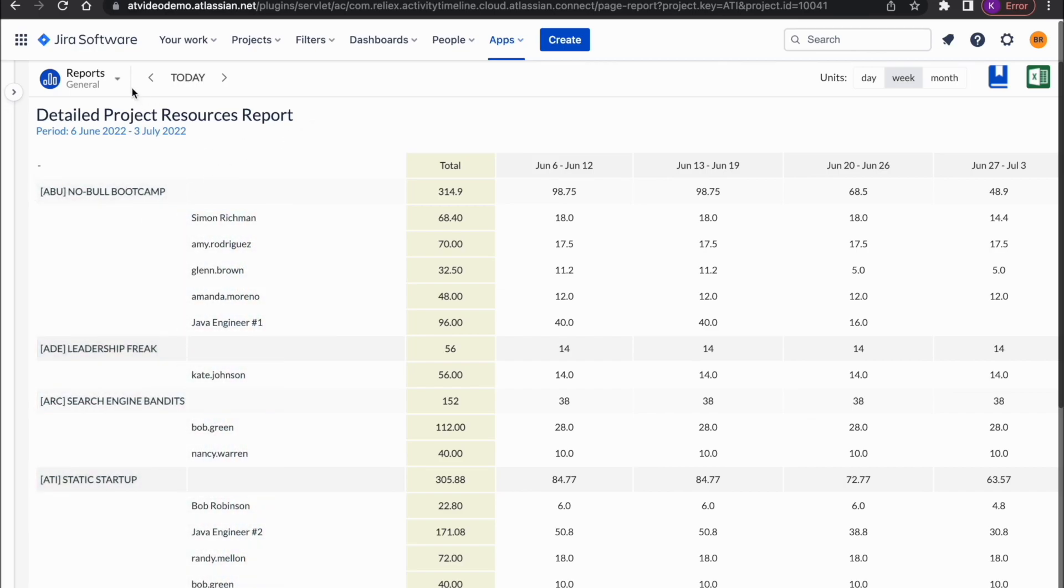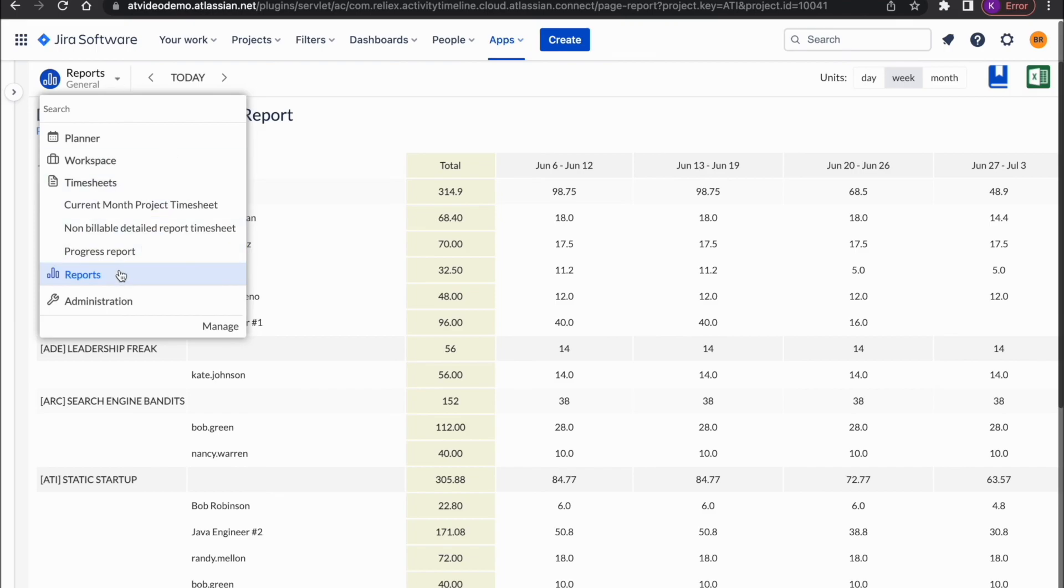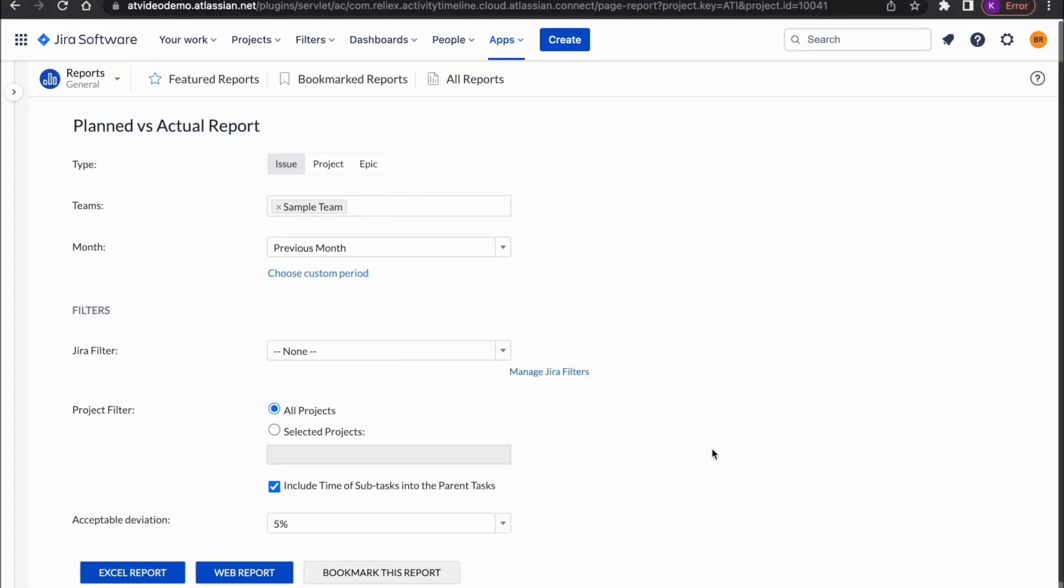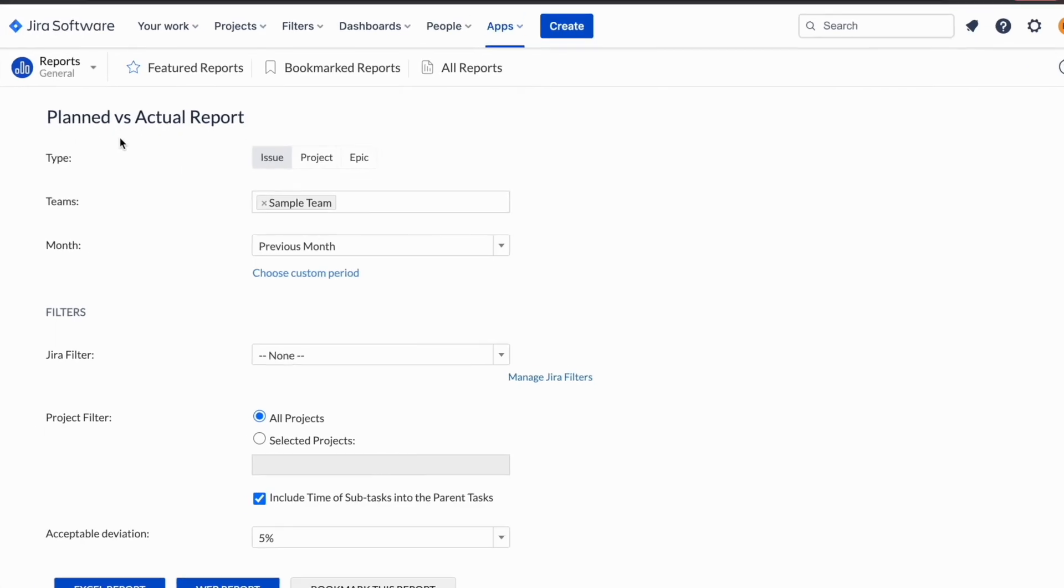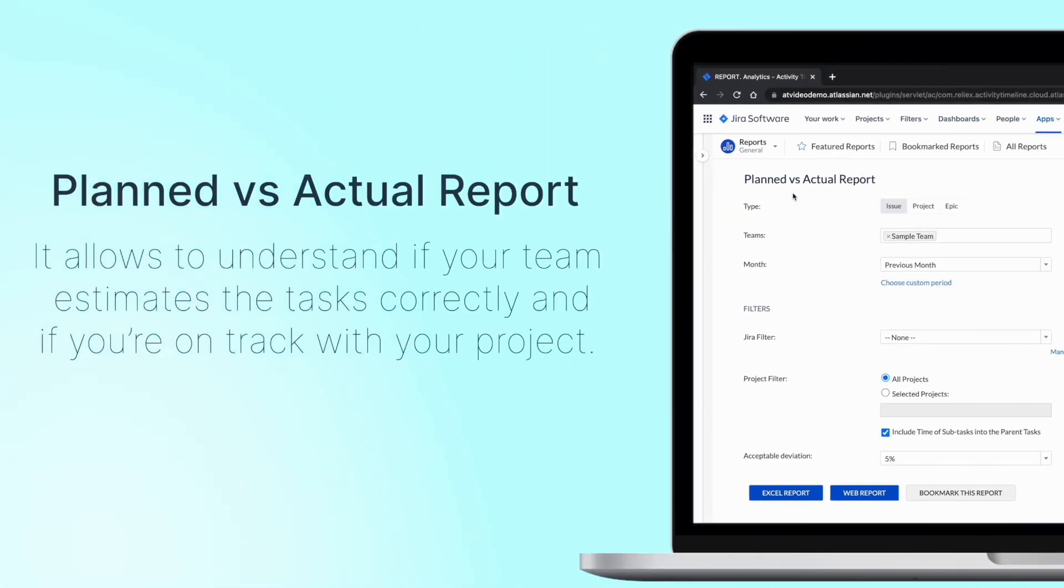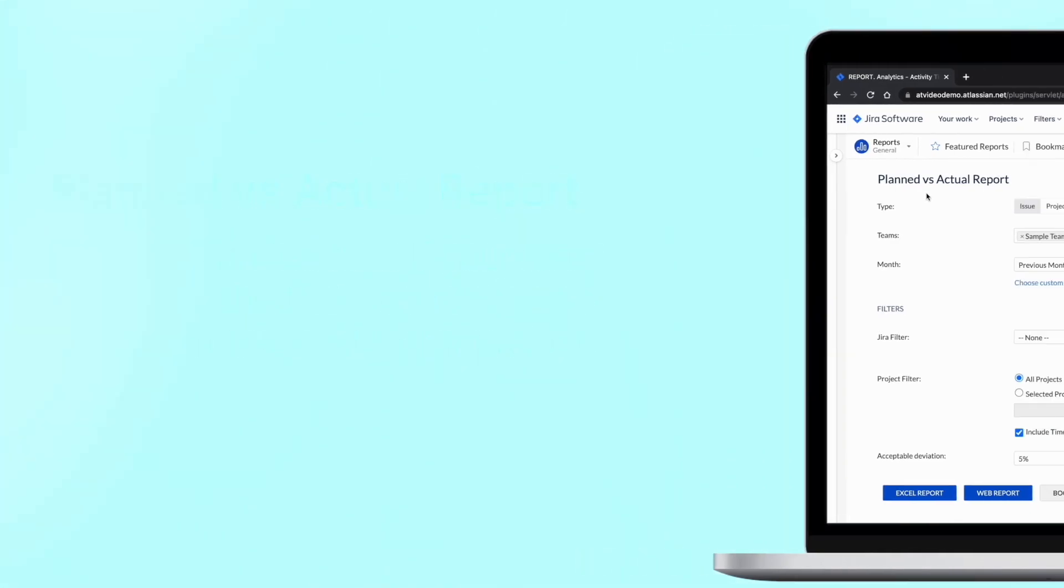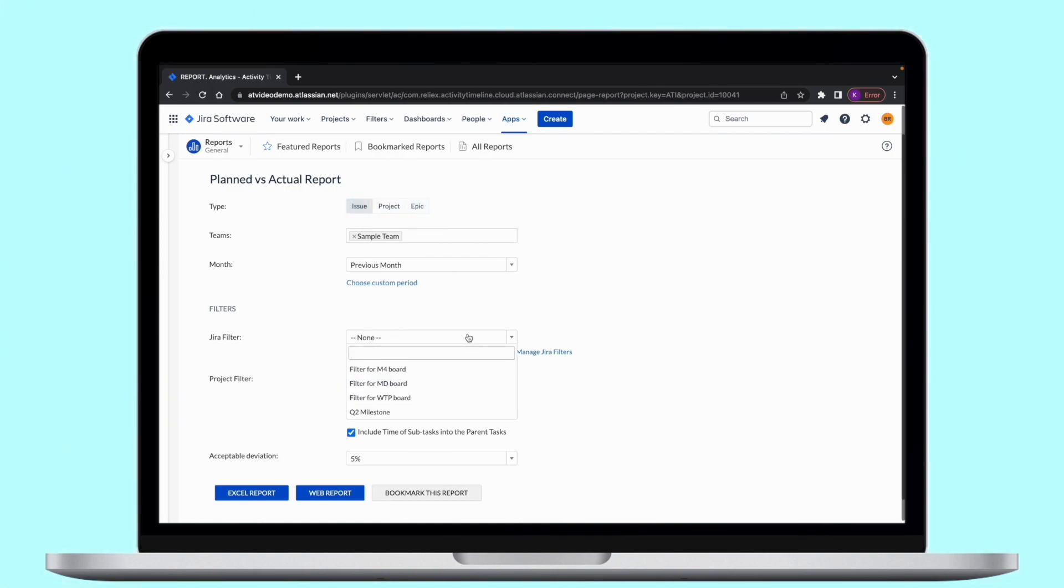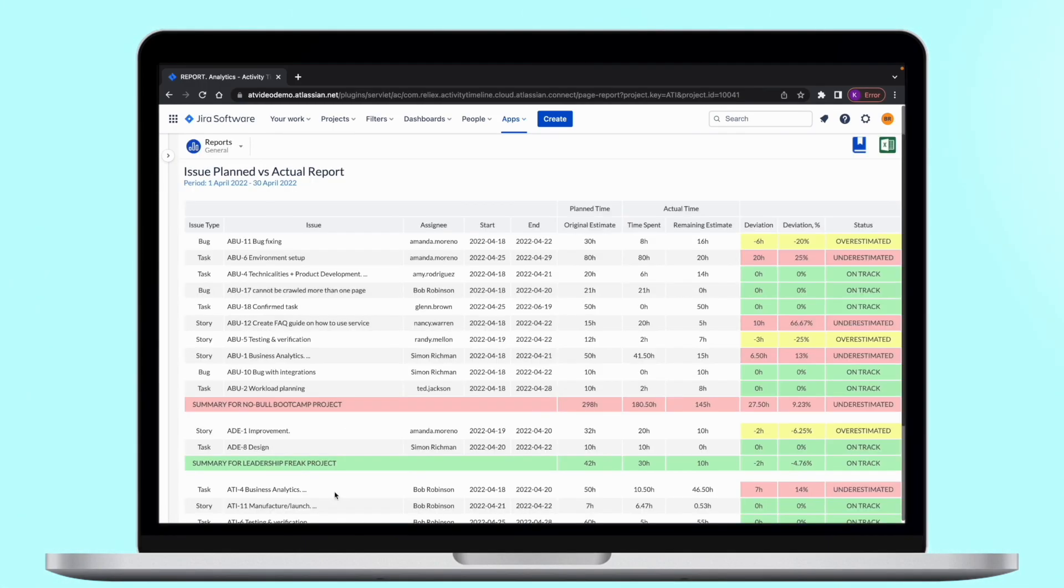And the last report we'd like to address in this video is our planned versus actual report. This report allows you to understand if your team estimates the tasks correctly and if you're on track with your project. It is available on the issue, project, or epic levels. You can also create a report either from the entire project or a set of issues using JIRA saved filters. The goal of this report is to provide a comparison between the planned time and the actual, which consists of time spent and time remaining.